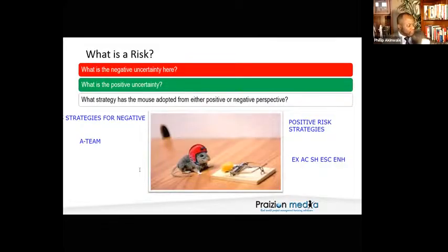And one more. Phil encounters a risk on a project. He looks at how big the risk is in terms of dollars and realizes it's a $200 risk. He decides to do nothing to deal with the risk. What strategy is that? Give me a pinpoint precise name, more precise than acceptance or accept. I'm not doing anything. I'm not doing nothing. Thank you, Maribel. That is correct. It is passive acceptance. That is exactly what it is. Not doing anything to deal with the risk is passive.